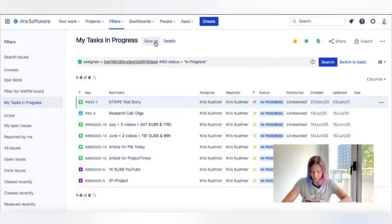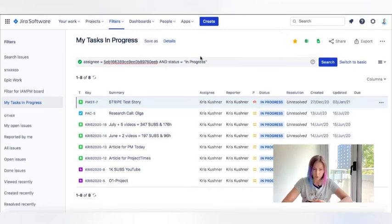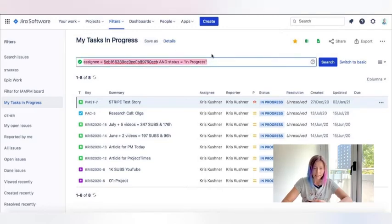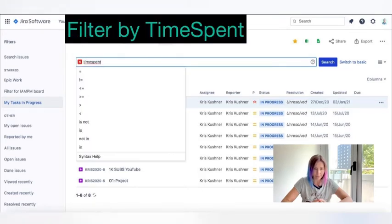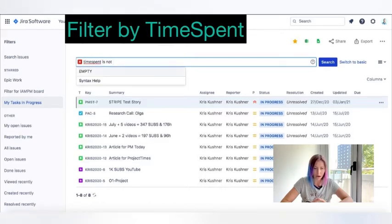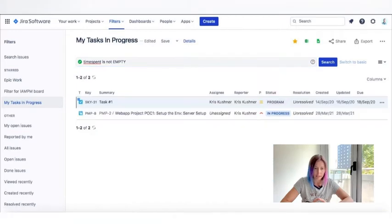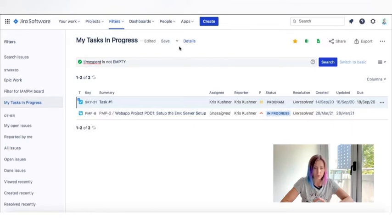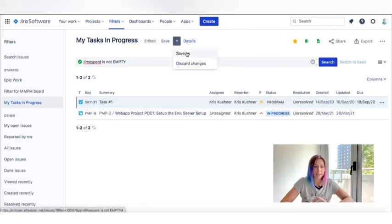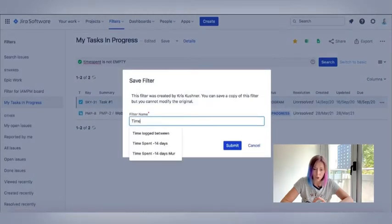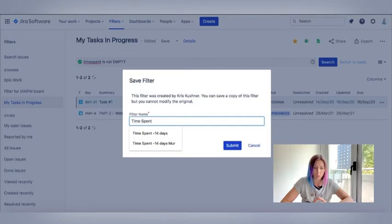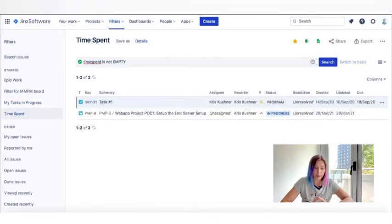The next third filter that I would want to share with you is time spent on tasks. As you know, estimates are important in project management. So we really need to know how much time was spent on the tasks the team is currently working on. So to do this, what I'm usually searching for is the tasks where the time spent is not empty. It can show me which tasks were actually worked on and where can I find the time log. So let's save this filter as well.